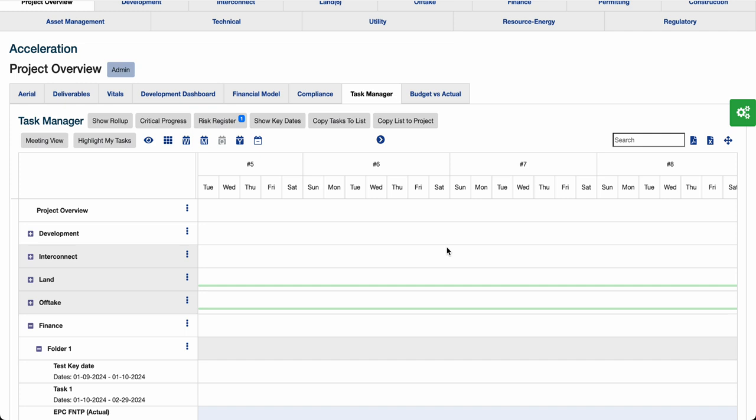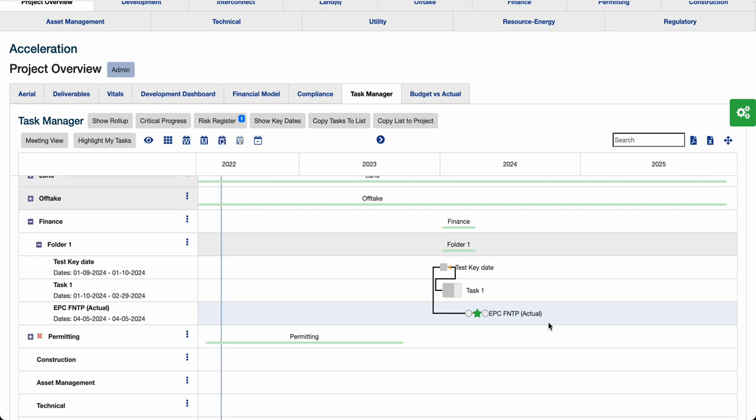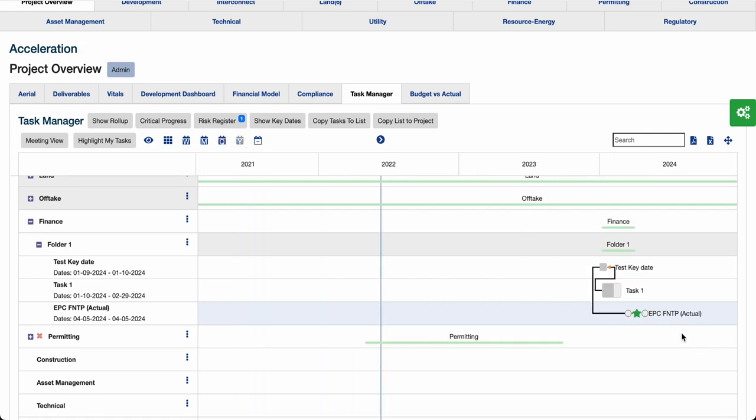And all of the dependencies that exist for tasks also exist within a milestone. So you're able to draw finish to finish, start to start, etc. dependency that involves a milestone, and have those be enforced. Similarly, I can't move this to a date which it is not allowed to go to, but tasks that are its predecessors will move the milestone.